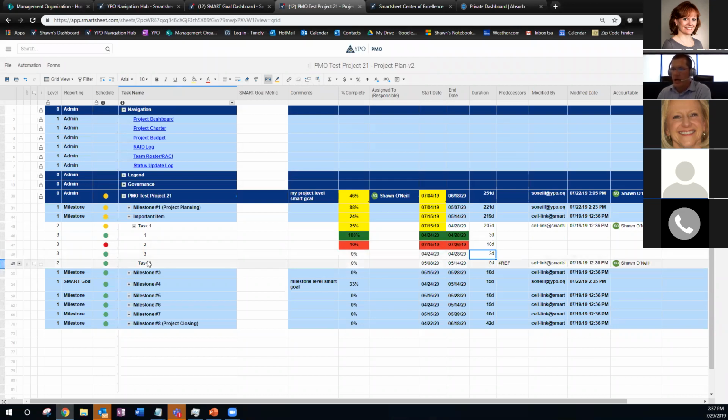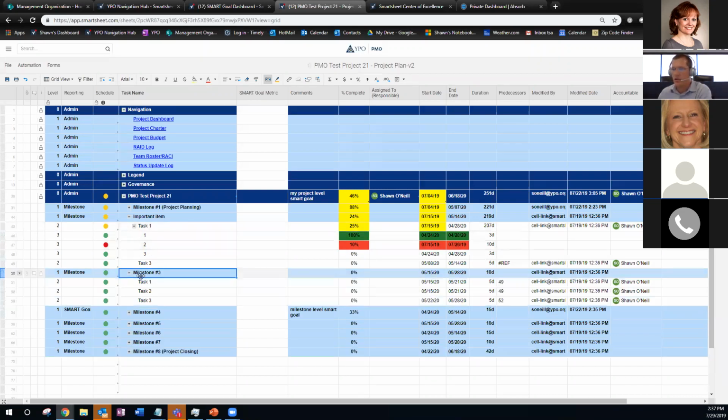We can cover additional details in the future, but step one of your project will be to create your tasks, assign dates, and set up predecessors. You can put it in sequence, give it what needs to take place. You can indent, outdent, and make everything how you like it. You can make it simple. If your project is simple, then you don't need so much complicated stuff. Just have a sequence of tasks 1, 2, 3, and done. That's all you would need.